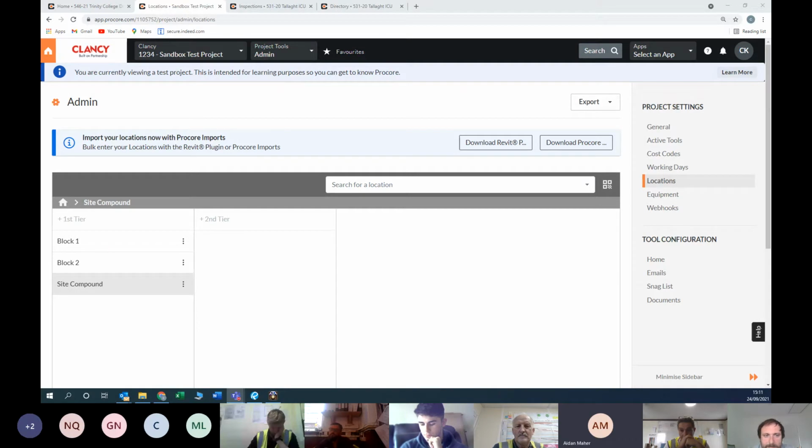The only other thing is the paper for this, the 30-page sheets to print off those tags. That stuff comes from America, it's not actually local. So you want to allow 2 weeks and let Christine know what you're buying those stickers for, because it's an exact brand, and the wrong one doesn't actually work. So, small things. We've put in a bulk order anyway, so that we have spares going forward. It was a problem the last few weeks. Other than that, very good.